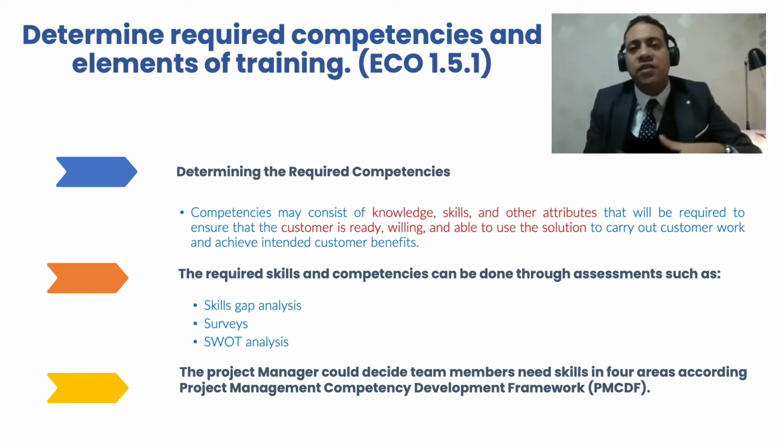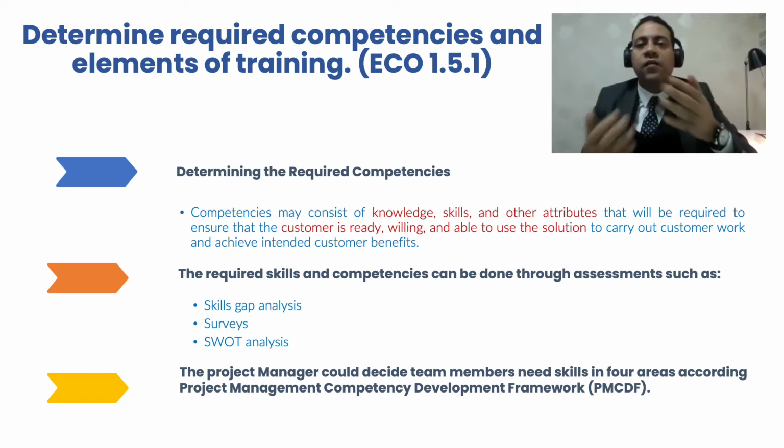The skills gap analysis involves conducting sometimes questionnaires, interviews, and surveys in order to collect feedback from the team and stakeholders regarding their training needs. Skill gap analysis might also include SWOT analysis. SWOT stands for strengths, weaknesses, opportunities, and threats. This will help us to identify the strengths and weaknesses of our training talents or training needs.